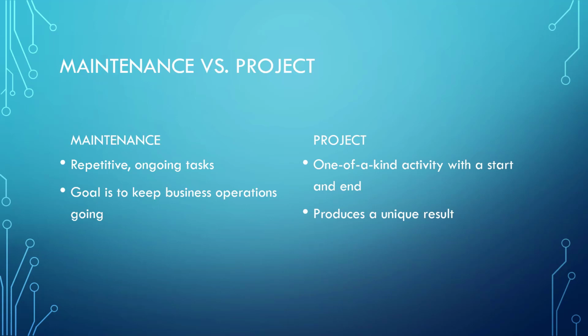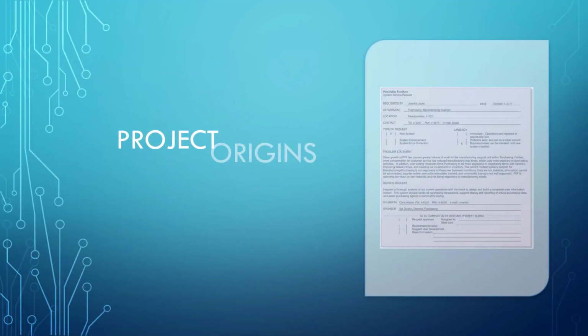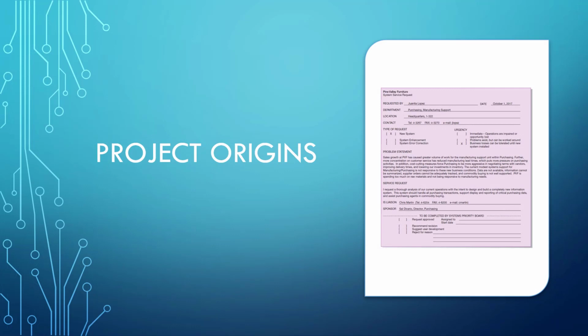Project managers manage projects. This means that from start to finish, PMs have a responsibility to make sure that a project stays focused and reaches its end goal. There are 4 phases a PM goes through during a project: initiating, planning, executing, and closing. Typically, a project starts with an idea to either address a current business problem or to try something new. This may vary from company to company, but this kind of request is documented and reviewed by a committee or an individual. Once the request is reviewed and accepted, a project can start.